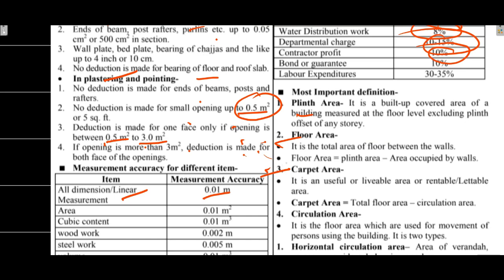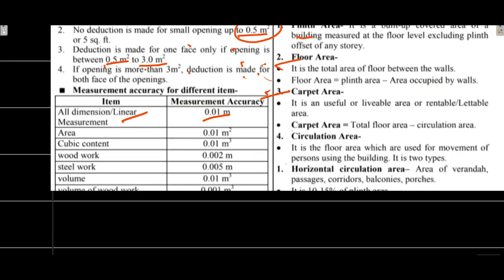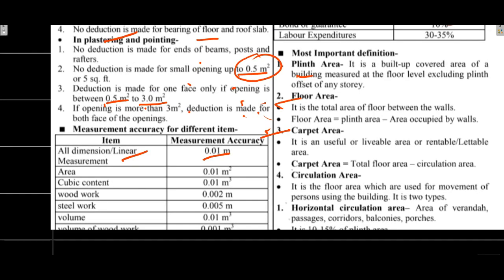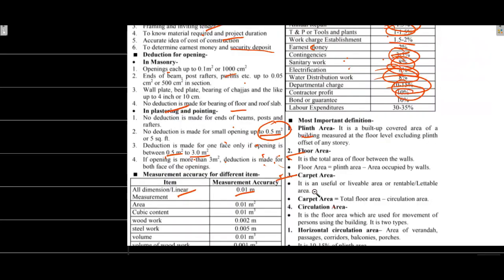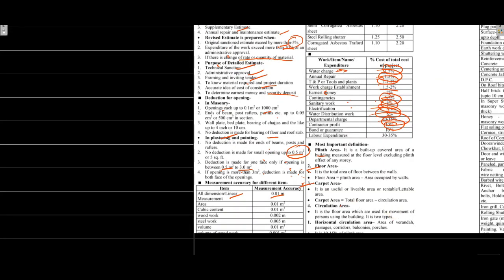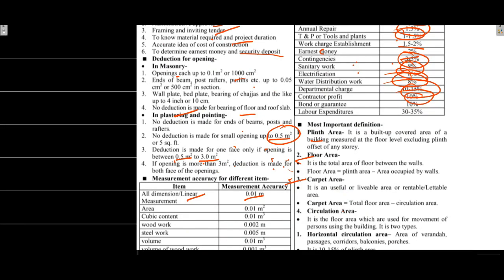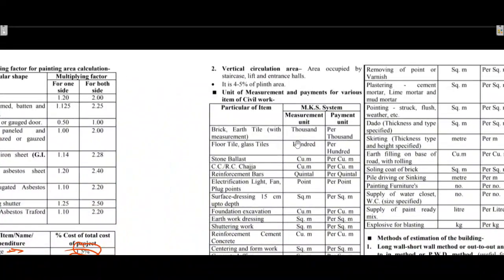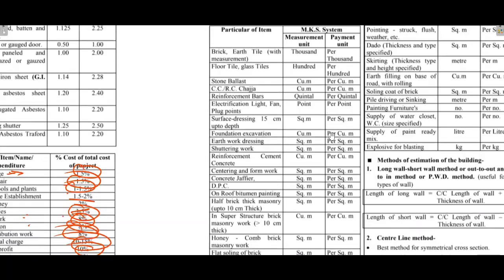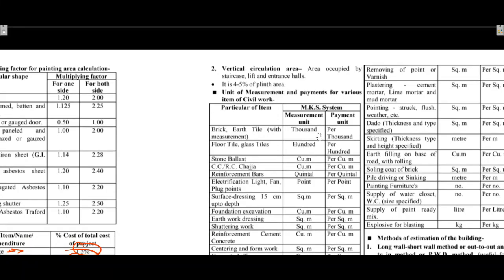Circulation area is the floor area used for movement of persons using the building. Horizontal circulation includes corridors, balconies, passages, verandas - around 10 to 15 percent. Vertical circulation area is occupied by staircase, lift, entrance - around 4 to 5 percent.